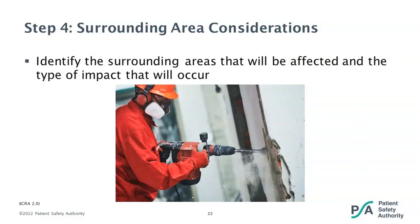Step four is also brand new to the updated tool and takes into consideration the surrounding areas and how they will be affected. The best example to demonstrate the importance of this is if you have an extensive project requiring jackhammering the floor — you can think of every possible risk for the direct area, but you're still going to have a major problem if you don't consider that the jackhammering is taking place on the floor above an operating room. In a less drastic example more specific to infection control, we need to be aware of the ventilation in the direct care area and how it's connected to surrounding areas. The HVAC system may need to be contained to ensure organisms aren't being circulated through ventilation to other areas.